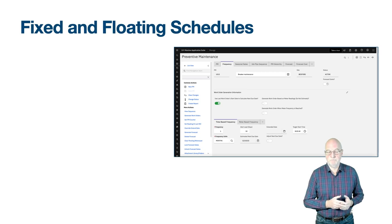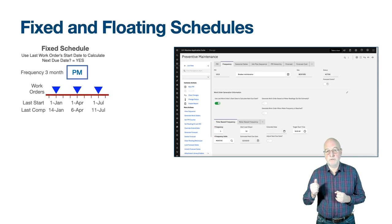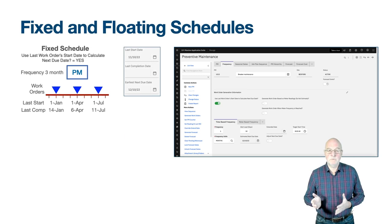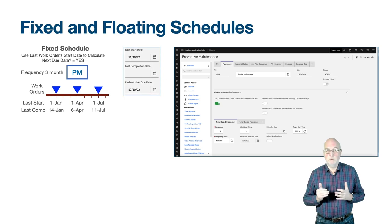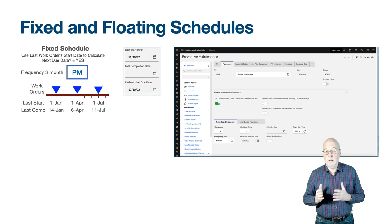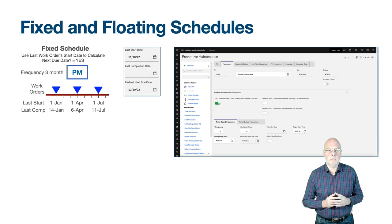A fixed schedule is easy to understand. If the target start date is the 1st of January and there is a three-monthly PM, then the next two target start dates will be 1st of April and 1st of July. Maximo uses the last start date of a generated work order to determine when to generate the next. With a fixed schedule it does not matter when you complete the work order. For example, work orders completed two weeks late on 14th January, six days late on 6th April, and 11 days late on 11th July — the inverted blue triangles represent the target start dates.